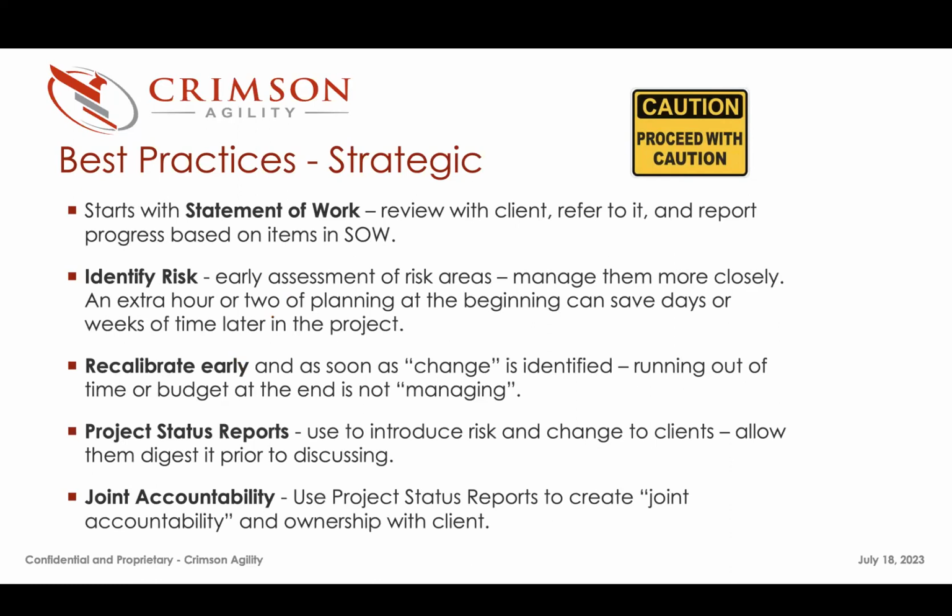Anais and I just talked about this new project. We're going to review with the client what we've outlined in the statement of work as it relates to data, and make sure they understand that the first 10 hours is gaining access, extracting the data, doing some data analysis and modeling it. If we can't complete that within 10 hours, we're going to go back and ask them for more time, because we can't use the other time that's allocated to customers and order data and product catalog data.